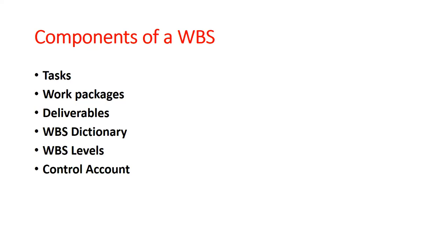Then you have your WBS dictionary. Also, in the WBS itself, we might not have the WBS dictionary installed as we're going. If you're using an Excel, yes, you could create your WBS dictionary on components of the project that you think need further explanation, right? You create hyperlinks on them. However, if you're using something like Microsoft Word, then you have to create your WBS dictionary as an appendix or glossary that will provide further information on what the work packages or the work tasks are.